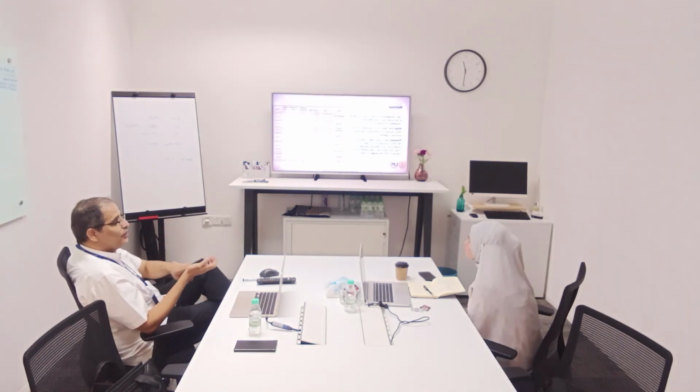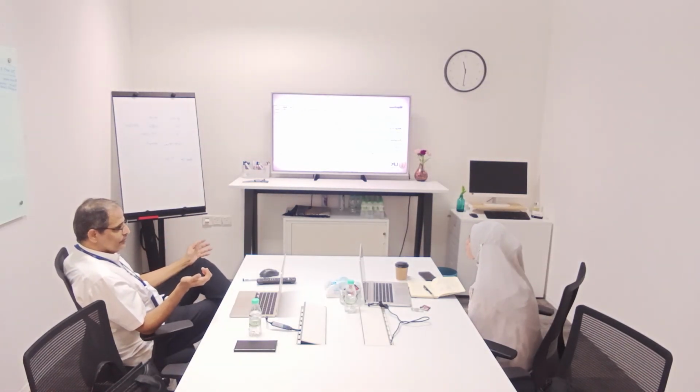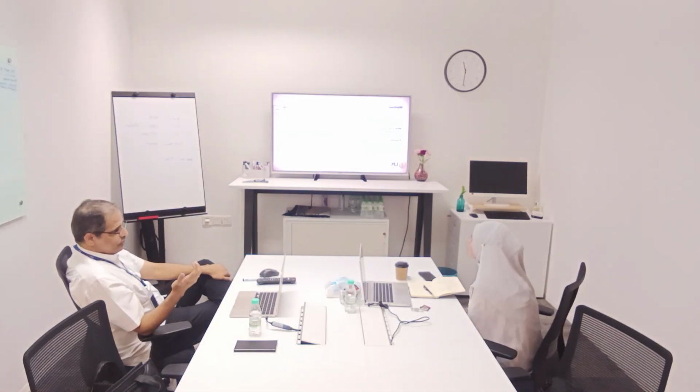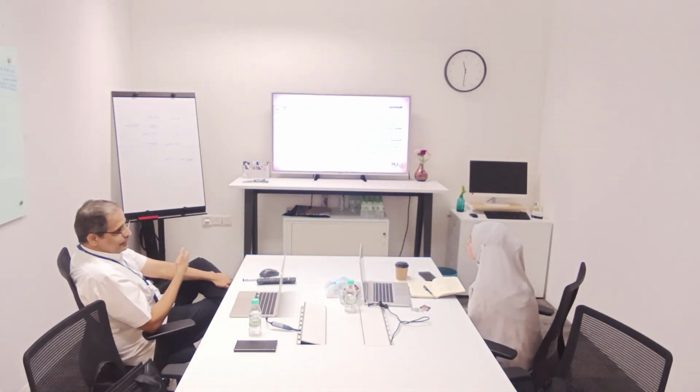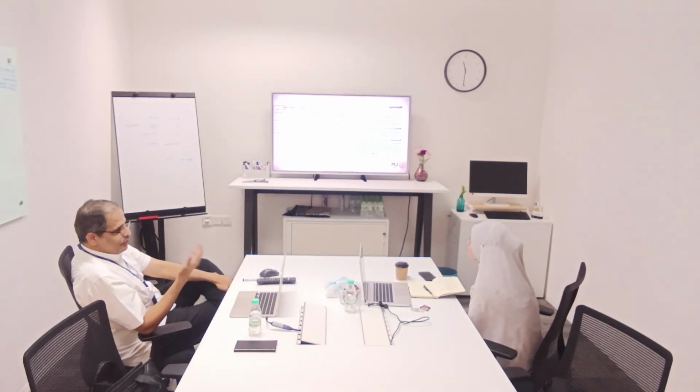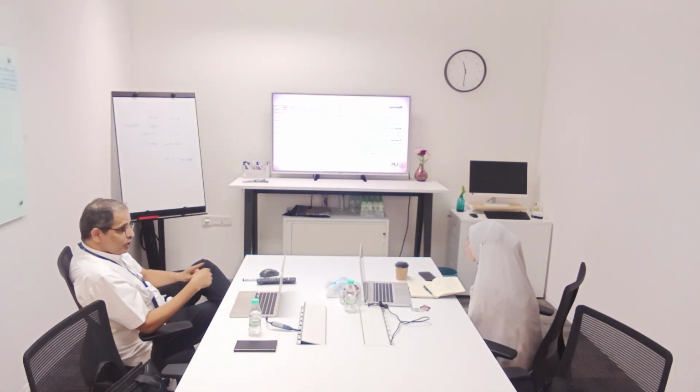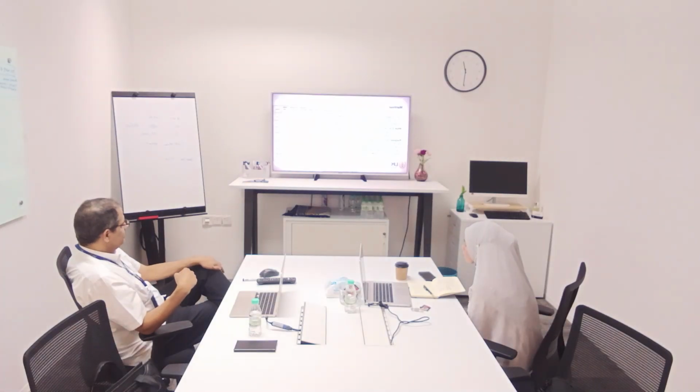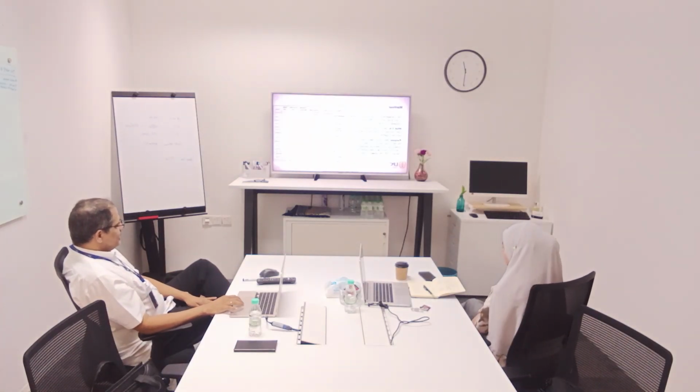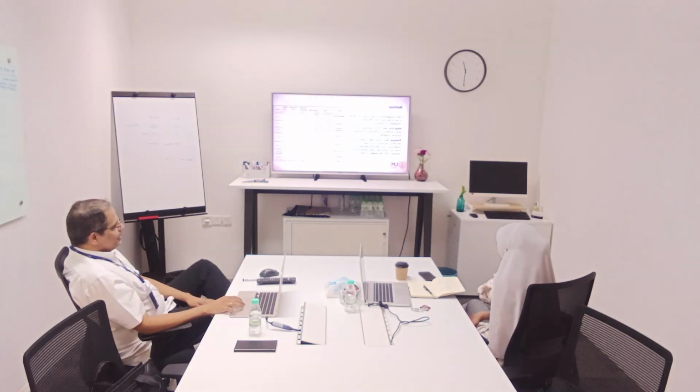That's why you run out of budget. Most of them run out of budget not because the task is more than what we asked them. It is actually the same task, but they take a longer period. That can be told by comparing the KPI.